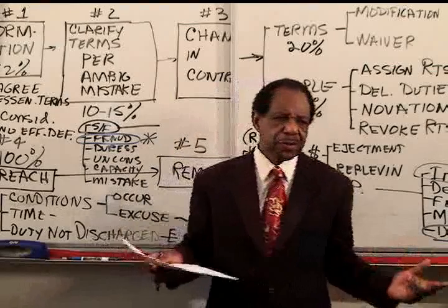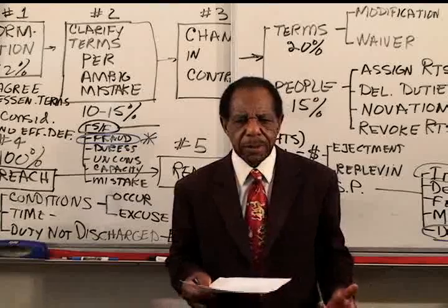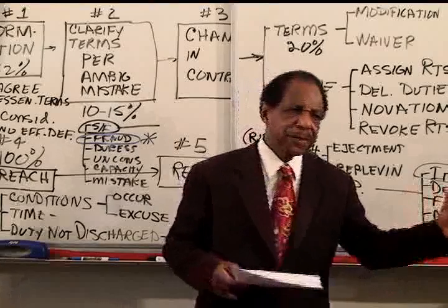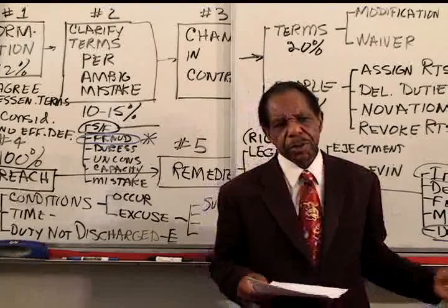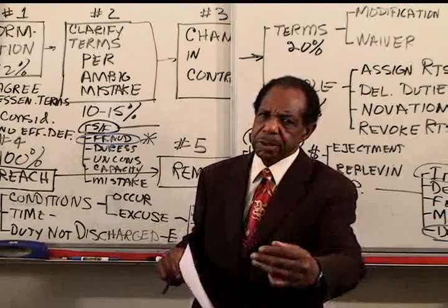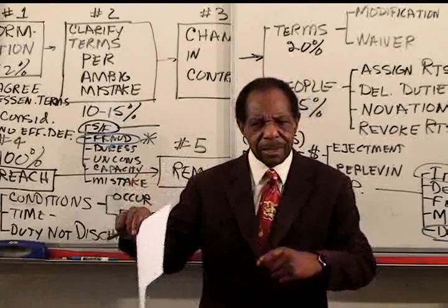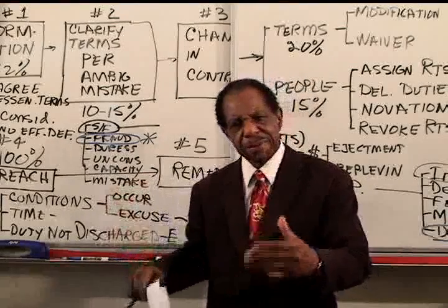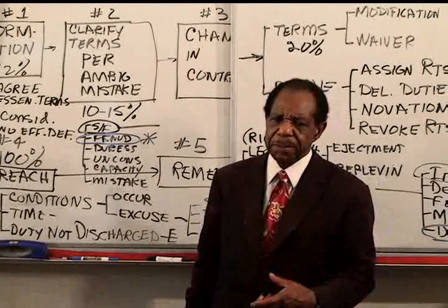So I think they should have matched them perfectly, but there's a debate here. The owner did not make it perfectly clear that I require a perfect match. And when you want fancy taste, you need to make it very clear to the other side that fancy taste is involved, because their standard of performance is now much higher to meet your fancy taste. So you got to make that clear at the beginning.